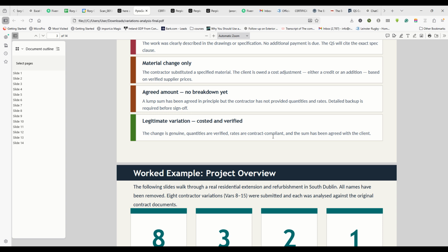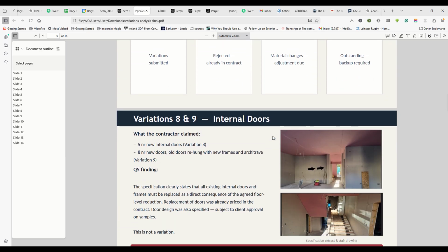And if you don't have that, somebody recently was trying 60, 70, 80 euros for chipboard in the attic, where plywood was 34 euros a square meter, so he was charging double or triple for materials that were going to be cheaper. It just didn't make sense at all. But he was trying it on, and gamesmanship does happen, and you need to be analytical, and you need to know what similar materials to break it down. So here's a couple of examples.